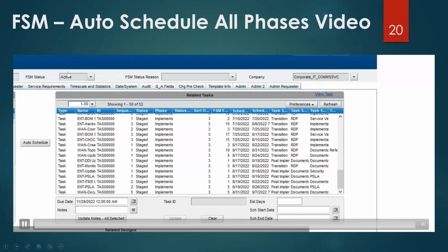Thank you. So one piece I failed to mention in my videos is that I don't allow you to backdate that schedule start date for the first item. It has to be future in order for everything to function. That was a requirement that we had on it, that we did not want them to be able to backdate things and pretend they've done work they haven't done, right?